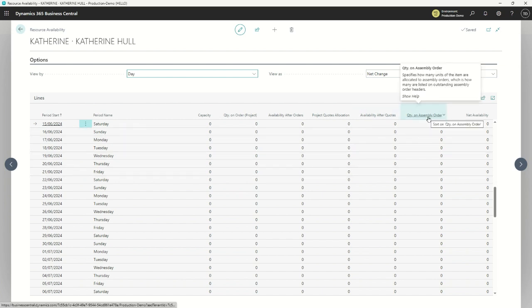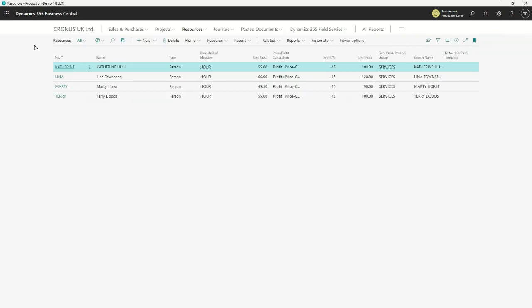Also — and this relates to assembly orders too — resources don't just have to be people. Resources can be equipment as well. Perhaps my company has one delivery truck and multiple projects going. I can put the delivery truck in here as a resource — maybe it costs £50 an hour to operate. If I'm billing clients for truck usage or delivery charges, I can set how much I charge them. A truck can have a calendar so I know how many hours on any given day it has available.